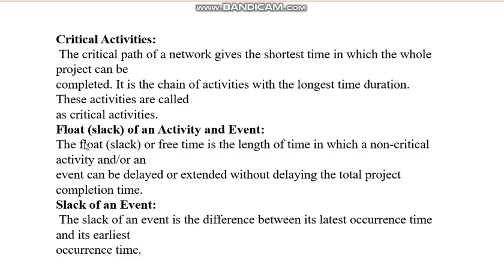Okay, then now let us see about the loose time. The loose time is called either float or slack of an activity. It is normally of an activity, not for an event, because an event is a point in time. Now the float or slack is the free time, the length of time in which a non-critical activity and event can be delayed or extended without delaying the total project completion time.